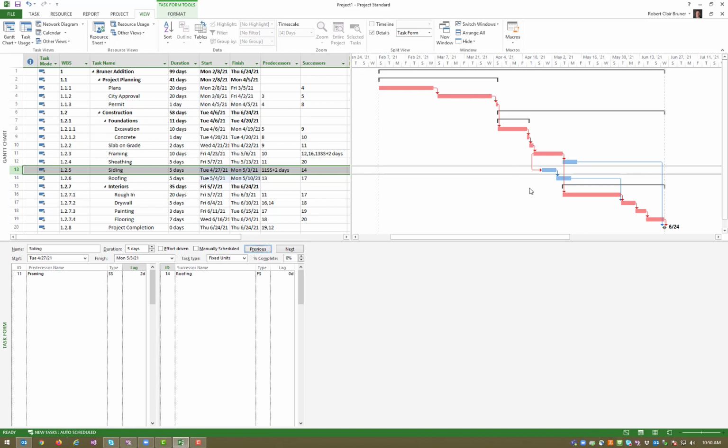This could be really valuable for your schedule, knowing that you can do finish to start and start to start relationships. The other thing that you can do, and some schedulers tell you not to do it, let's go to this relationship over here. You see I'm pointing at that red arrow. I double clicked on it. It tells me it's a finish to start relationship. Okay, we're going to leave it as that. But I want there to be some overlap on it. So I'm going to do a negative lag of 2 days. Now this one will start 2 days before this one ends.